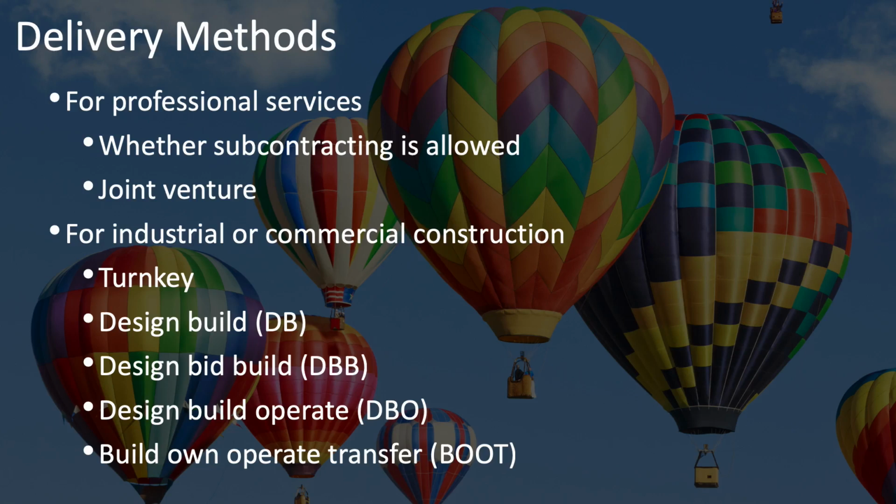The next type of delivery method is design build. Let's take the example first of building a building. You'll typically have an architect and a builder. However, you could choose to hire one organization that does both the architecture and the building. In this case, this would be a design-build type of delivery method. This is often applied in the mining industry, where you have the same organization doing the design and doing the building of certain plants. I experienced this in Outer Mongolia as I was working for an organization building a new copper mine. And they contracted with one organization to do not only the design, but the building of the concentrator.